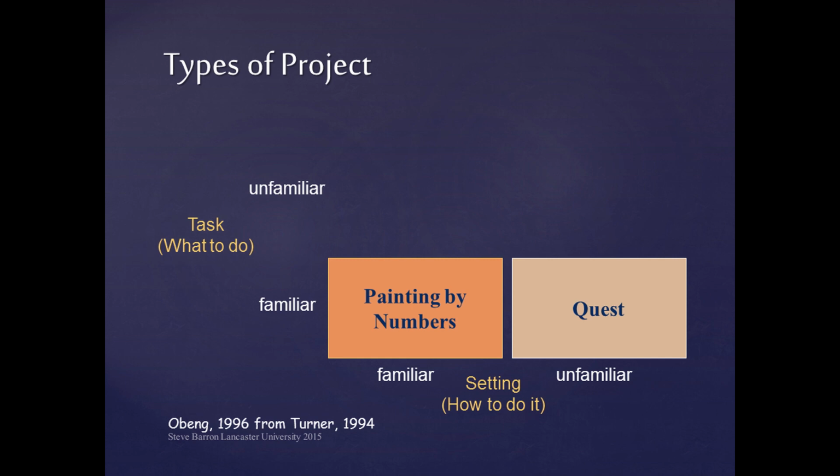If the project definition is clear and agreed, but the way these objectives can be achieved is unclear, then we have a quest-type project. Many projects are quest-type projects, and in those cases, management must focus on identifying ways to solve problems that we will find embedded in the project.